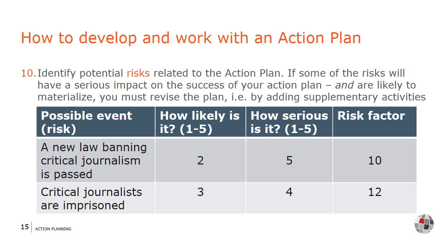One way of working with risks is the following. 1. Identify the risks. 2. Prioritize the risks according to seriousness and probability. 3. Suggest mitigating measures to eliminate or reduce the likelihood or seriousness of the risks. A short video on how to formulate assumptions and risks is available in the supplementary course material presented on the front page of the e-learning module.